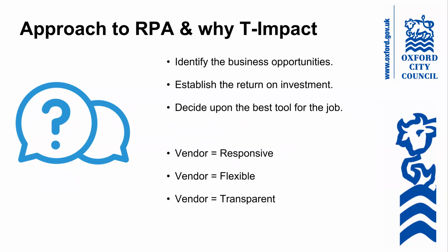So we learned a couple of lessons in the exercise of procurement, which was actually that we needed to know a little bit better about what tools were out there. And there are 4 or 5 international tools that are really, really good, and a variety of smaller organizations proposing their own proprietary RPA. And what we wanted was something that would give us sort of an open market opportunity, so we weren't tied into a single vendor. At the same time, we didn't want to throw all of our eggs into one basket by tying ourselves down with a long-term contract and then finding that we couldn't do anything with it.